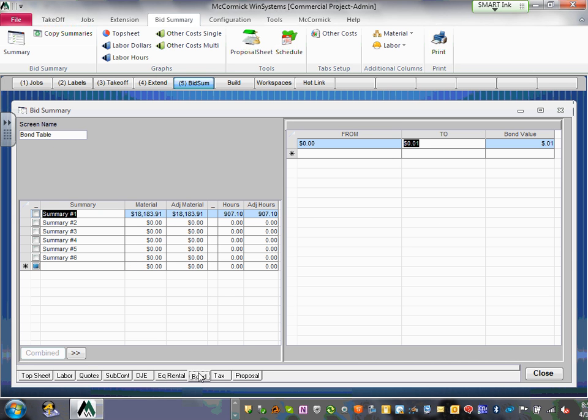Bond. Let's go to bond. Now this is my least info here. From 0 to 5,000. Let me see how we did the bond last time. Where did the bond go? Yes, the bond. All right. From 0 to 5,000, the value of the bond, if up to $5,000, it's going to cost us $100 to bond.